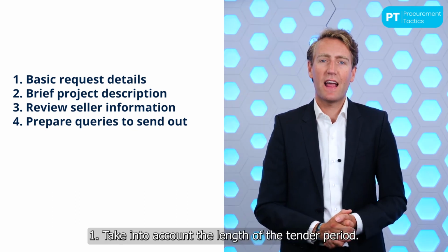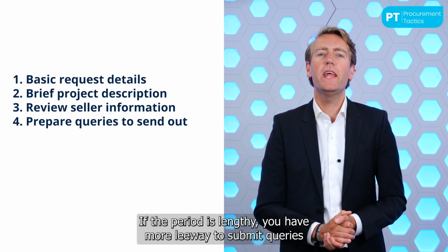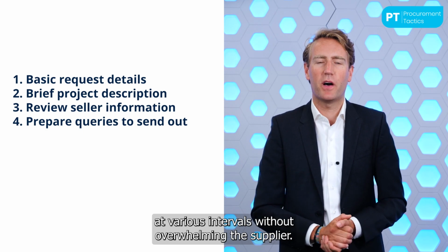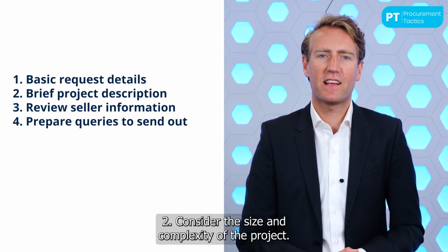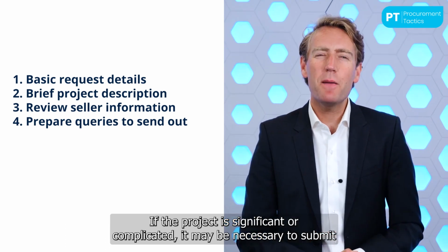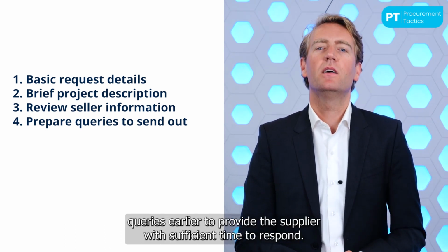Take into account the length of the tender period. If the period is lengthy, you have more leeway to submit queries at various intervals without overwhelming the supplier. Consider the size and complexity of the project. If the project is significant or complicated, it may be necessary to submit queries earlier to provide the supplier with sufficient time to respond.